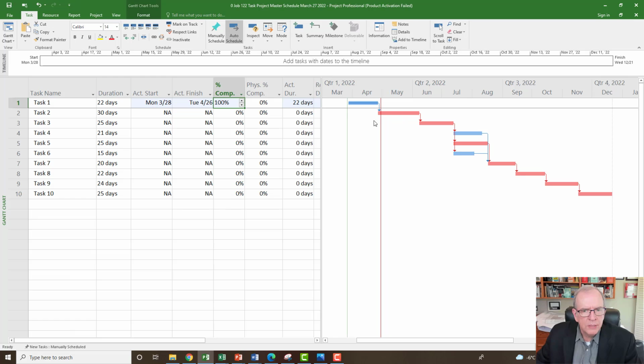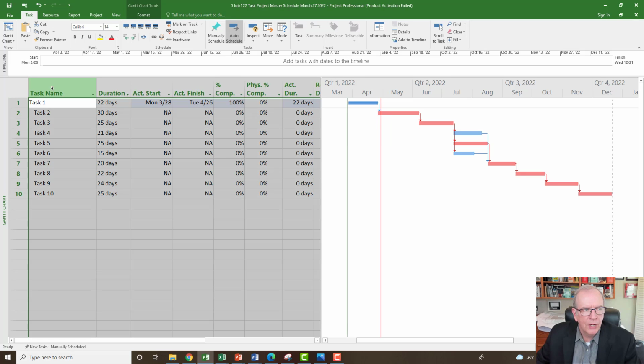And then I'm going to say that this activity went as we planned, like after it got delayed somewhat, and you'll see that in a minute. So I'm just going to mark it on track. So I click the square icon box, and I'm going to go along here. Mark on track will mark anything on track to the left of the status date. It won't mark anything to the right. So usually all I do is I just click the square icon box, it selects everything, and if everything to the left is where I want it to be, it'll just update them to the actual status date, right? And it'll say what percent of this activity is actually done. So it's saying 10%. So this would be the equivalent of 3 working days out of 30 working days.